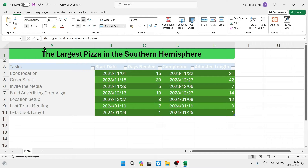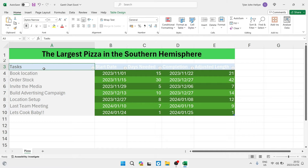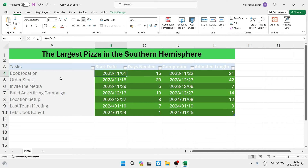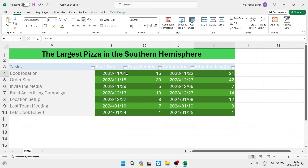The first thing we want to do is set up our actual table. We want to have a heading — this can be whatever you are needing to gather data for. On the left hand side you can see the tasks, such as booking a location, ordering stock, and so forth for the task of making the largest pizza in the Southern Hemisphere. We'll then have start dates for each task and completion dates. There are 21 days difference, and that is the adjusted length column — but the days actually needed to complete this task is 15 days.